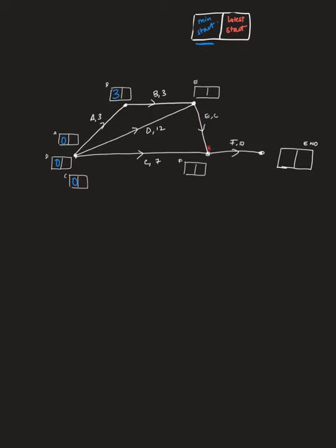All right, so continuing this process the whole way through, to come into this vertex here, where I'm going to begin activity E, I've got a couple of options coming in, so I need to look at all possible options. So I've got to come through B, so to start B, I'm going to have 3, and then I've got to complete B, so 3 plus 3 is 6 is one option. And then my other option would be to come this way through here. So that would be to complete D, and D is going to take 12. So that is my other option. So 6 or 12.